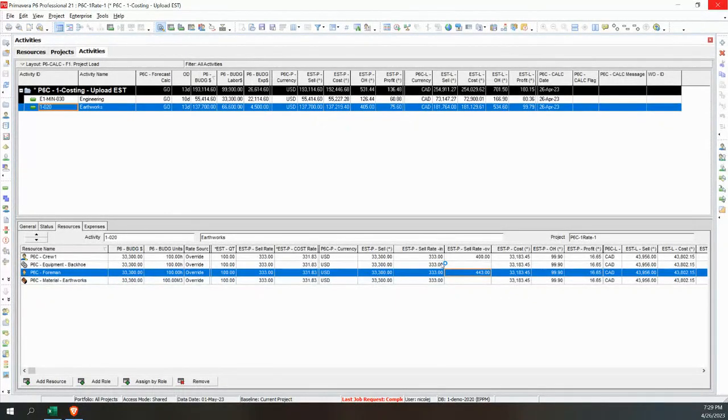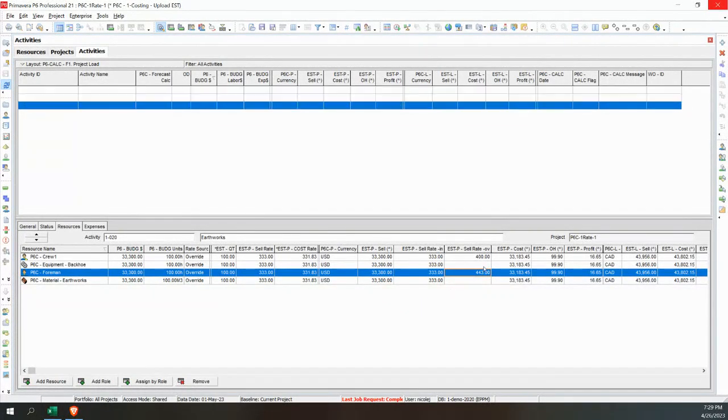So this is always the drawback that you get into and the struggle we get into using accounting systems for actuals. You need a place to manage the incurred or what's actually installed at the site. So overrides are really important anywhere that you're working in, whether it's in a cost control tool or in this case in P6. Okay, looks like it's coming.